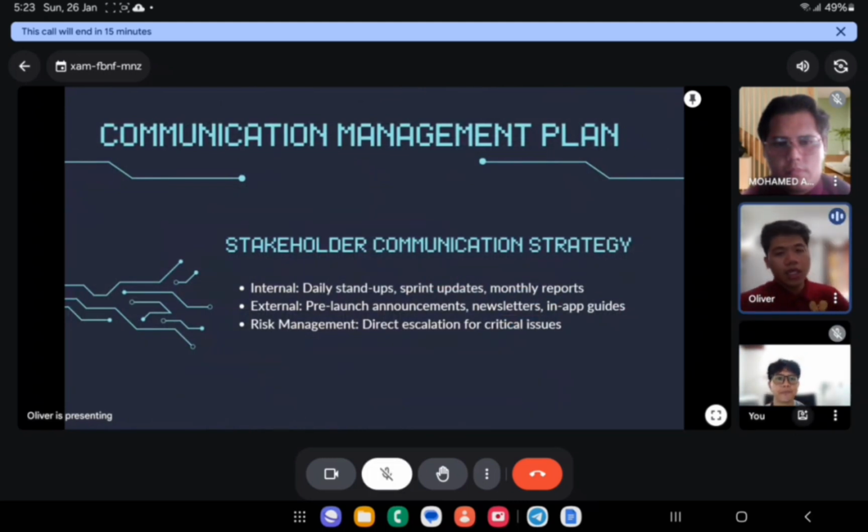Okay, thank you, Haziq. Now for the communication management plan. The first topic is the stakeholder communication strategy. There are three strategies. Internally, our company uses daily stand-ups, sprint updates, and monthly reports. For the external, we have pre-launch announcements, newsletters, and in-app guides. And for risk management, we have direct escalation for critical issues. Whenever an issue arises, Evo Asia uses direct escalation.